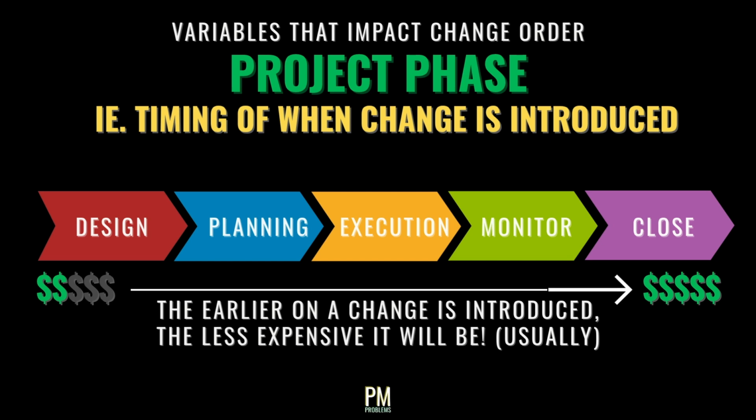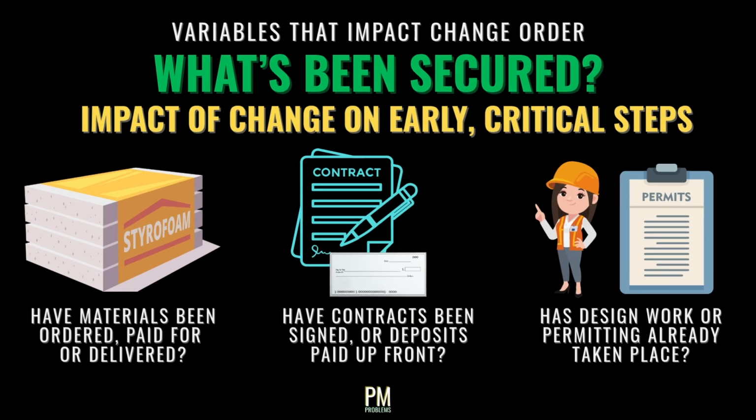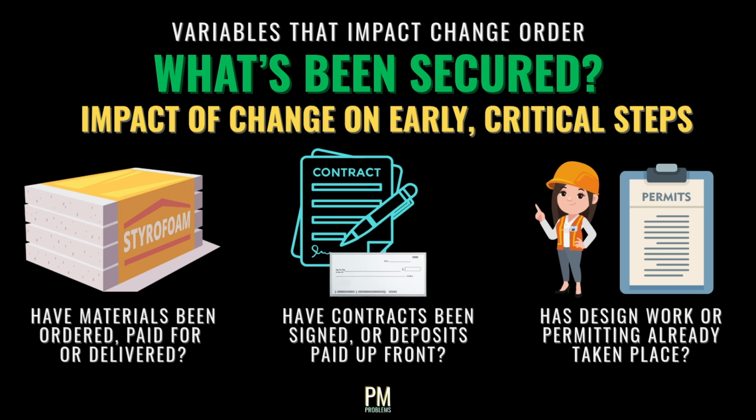Generally speaking, the further along a project is when a change is introduced, the higher the cost impact will be, and the more likely that additional time will be needed. We'll get into the specifics in the following sections, but this general principle is worth pointing out as a concept. In many cases, steps taken early on in a project's process can carry significant value. Therefore, changes that are made after a project starts, even if they happen early, may still be impacted by what was done at the very beginning.